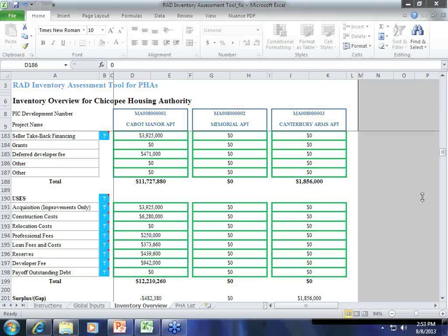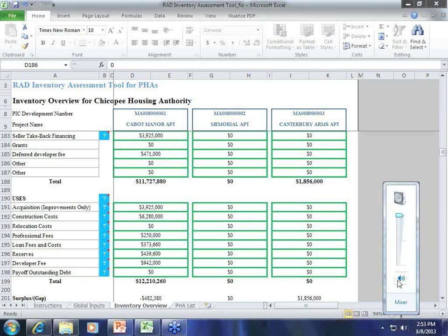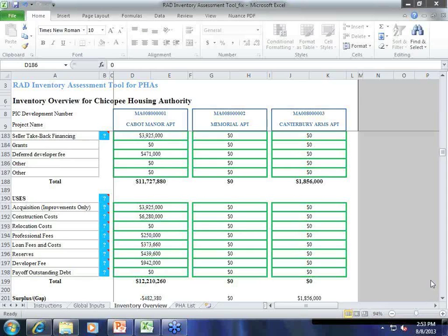Sure, you can. I would caution you to make sure that the Housing Authority and you coordinate with FHEO, because if in fact rolling that into your RAD causes a delay, whenever the RAD construction starts post-closing, and that impacts your schedule, you're going to want to talk with FHEO about, if necessary, modifying the VCA to accommodate that additional influx of funds, so that you can do more complete rehabilitation while bringing the units into compliance, if that makes sense.